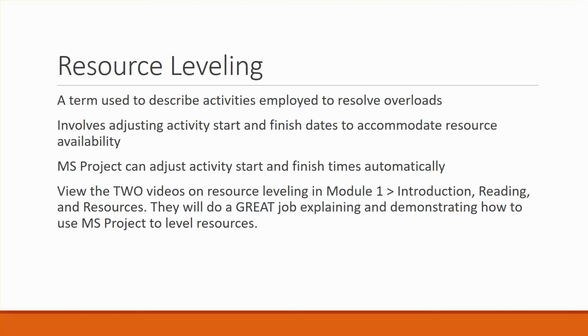So I would take my work breakdown structure. I would play with the automatic allocating of resources. And then I would save with a different name, version 2, version whatever, I don't care. But I would make sure that I kept the original version intact and then the automated resource allocation.